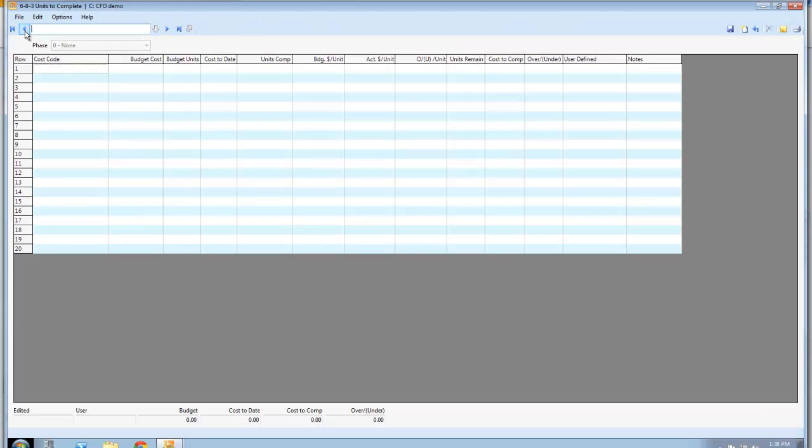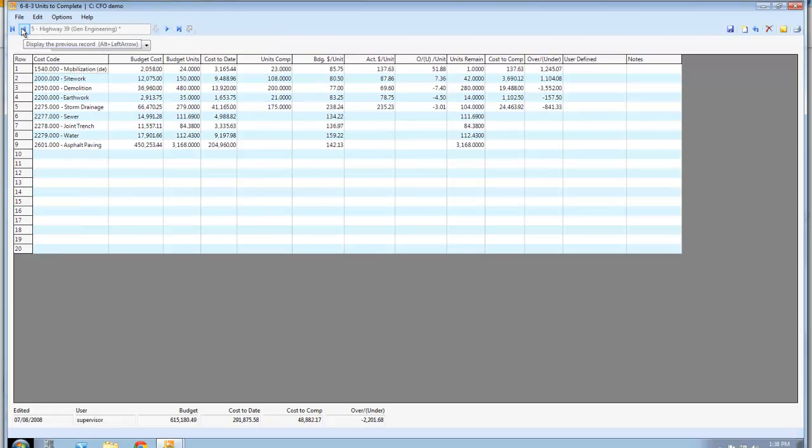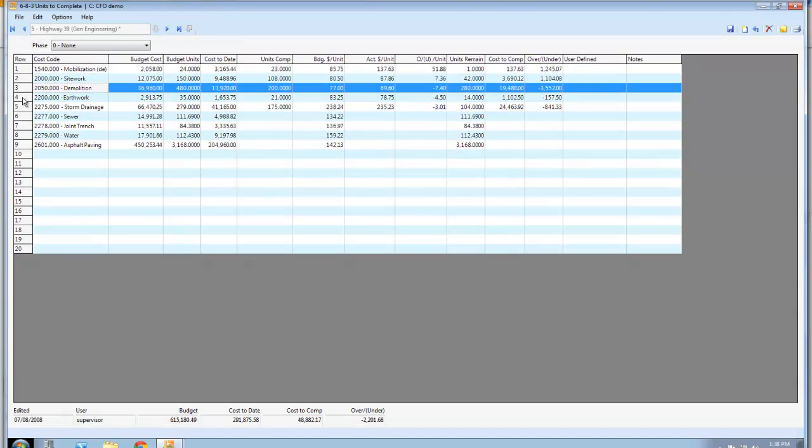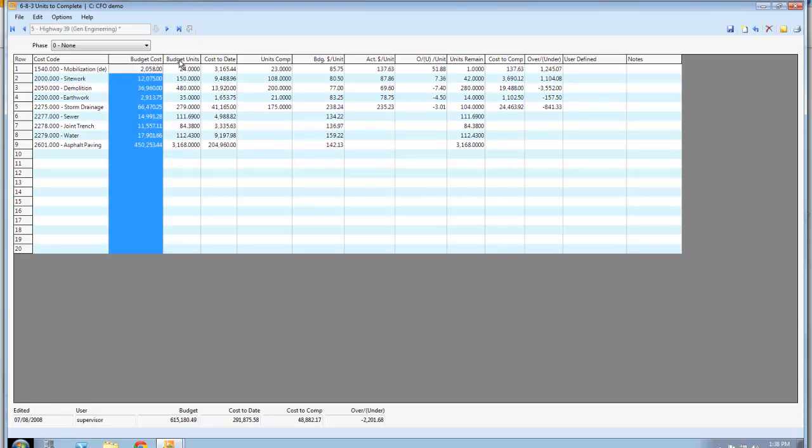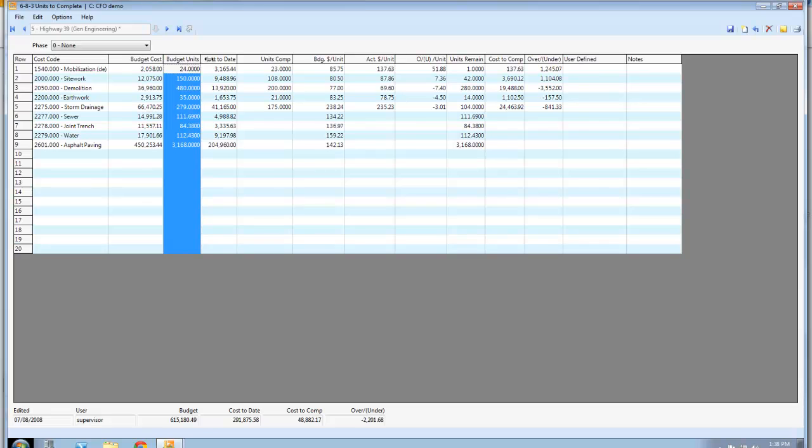And I apologize, I don't have an electrical job, which would make more sense, obviously, but you'll get the idea in a second. Plug your items in here. Could be pull wire, mount boxes, wire boxes, whatever those tasks that you do are. This is the budget that you put together. This is the number of units that you had to do. But now what I can tell you is, I'm not looking for percent. I'm asking you, how many of those 25 gang boxes have you got installed? And we're just going to make this bad. We'll make this 15, okay?